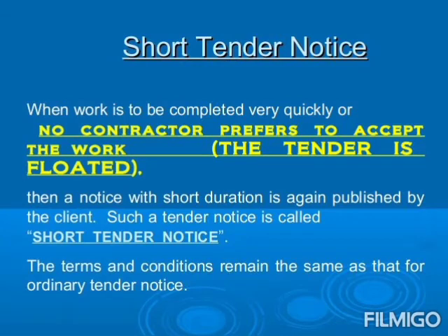Short tender notice. When work is to be completed very quickly or no contractor prefers to accept the work, that is, the particular tender is floated, then a notice with short duration is again published by the client. Such a tender notice is called short tender notice. The terms and conditions remain the same as that for ordinary tender notice.